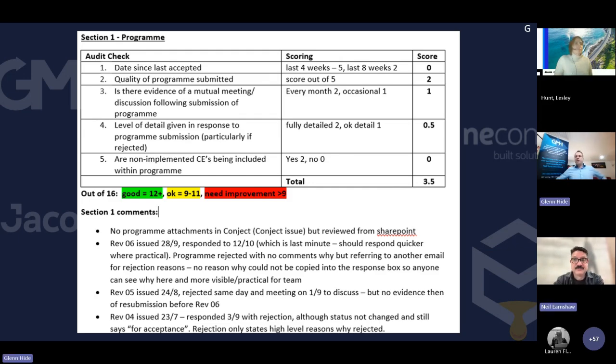Yeah, with the new sanction is good, isn't it? It's useful in NEC 4 that if they don't respond at all, we know that we can notify the lack of response. If they don't respond within a further week, then the new NEC 4 provision is that it's deemed accepted. But you're right, it doesn't go into massive detail. If the project manager does respond but doesn't comply with clause 13.4, i.e. state in enough detail what's wrong with it to allow the contractor to correct it, then it's limited specifically what the sanctions are, but all you can do is bring that up and talk to them and say, you know, you are obliged under 13.4 to explain, have a meeting, talk.